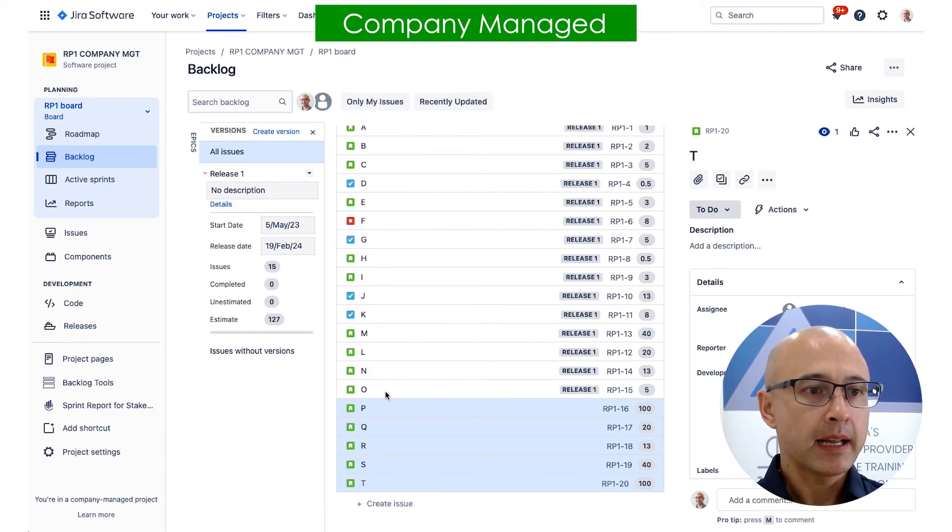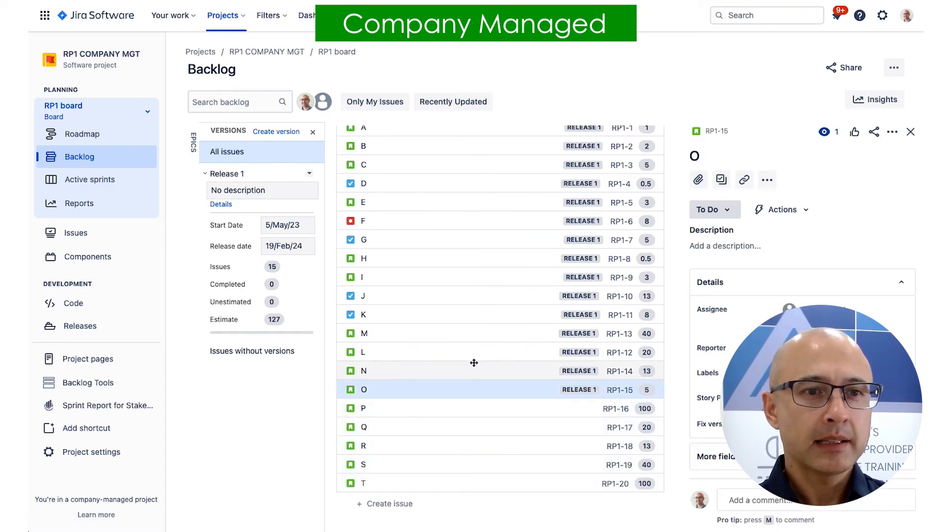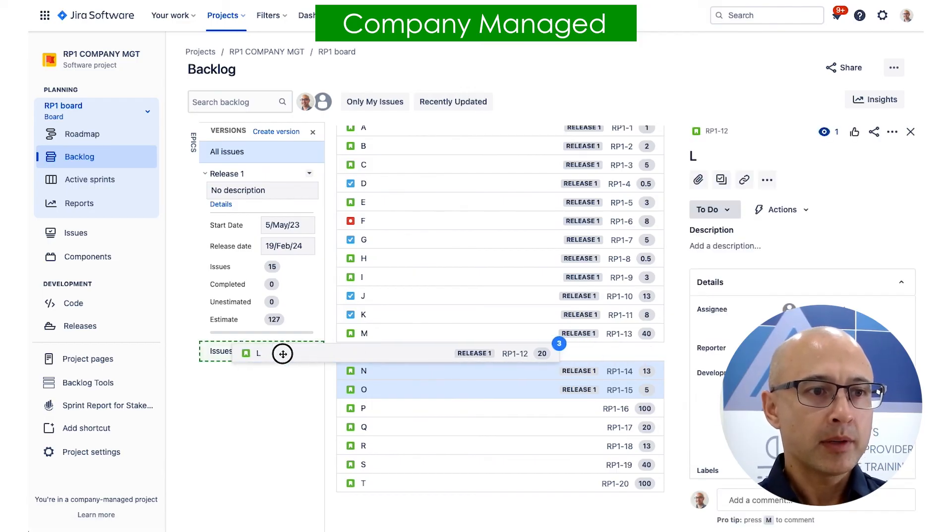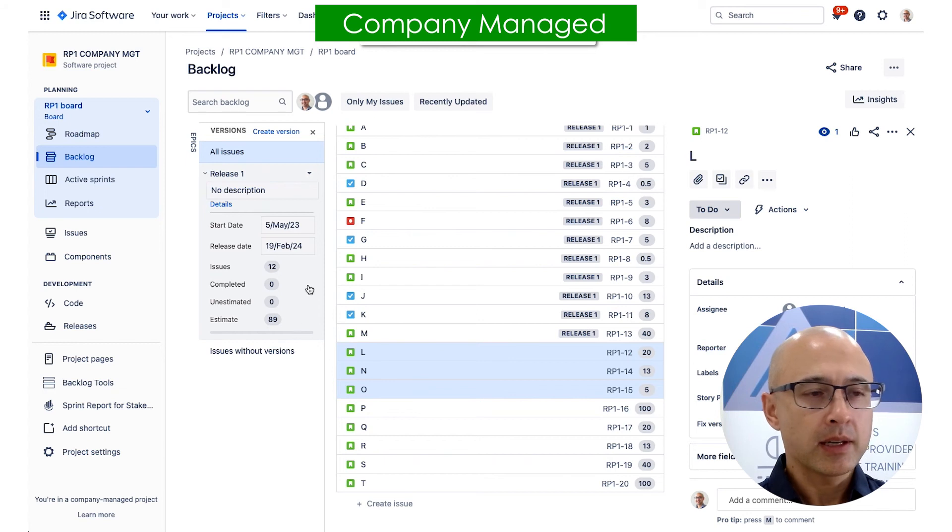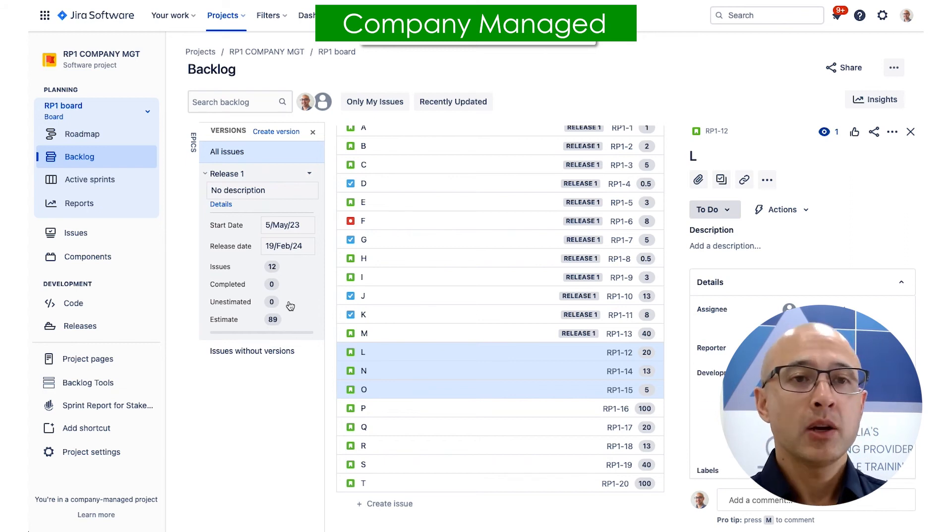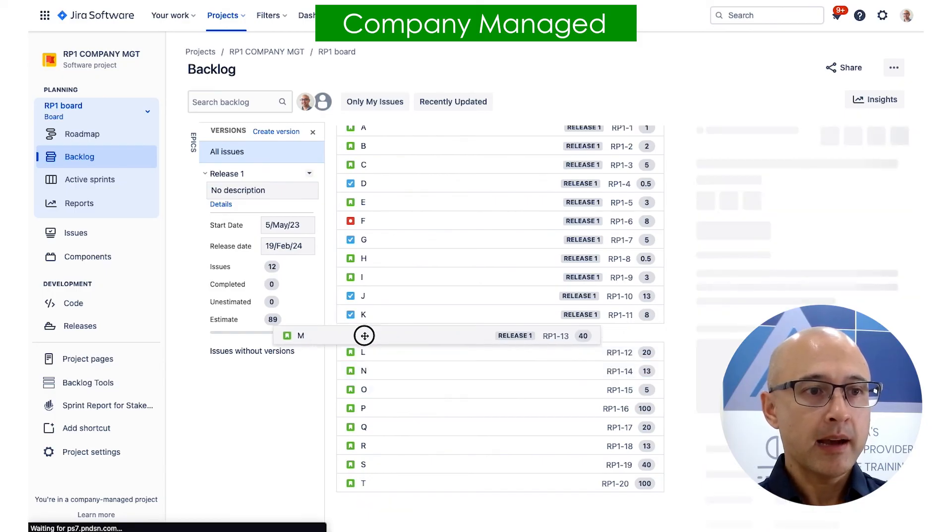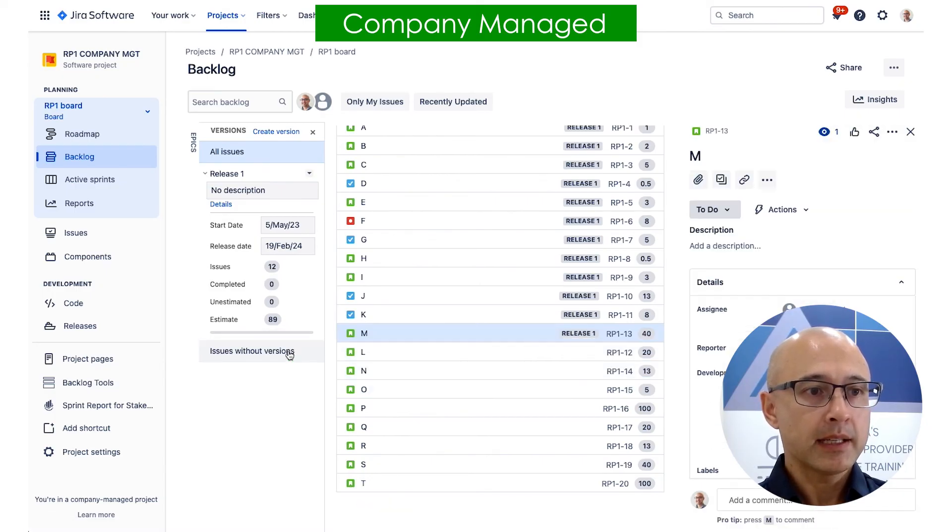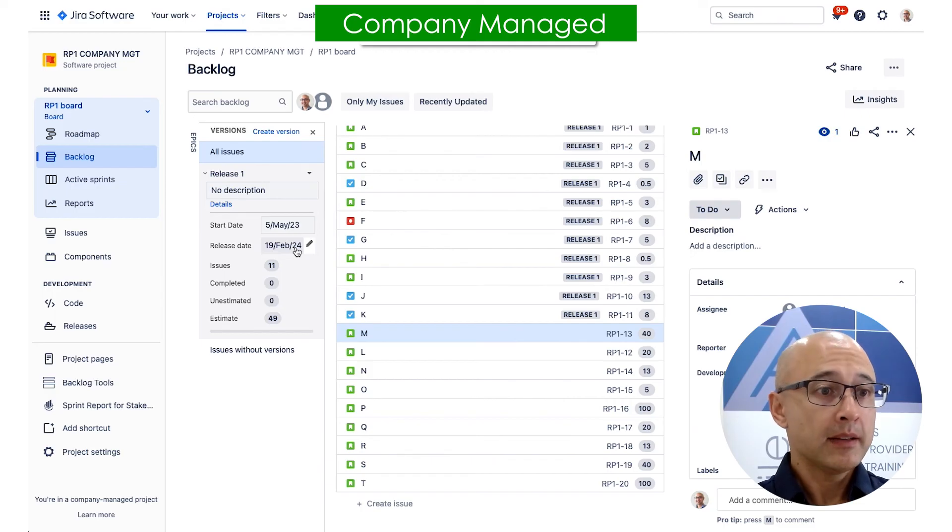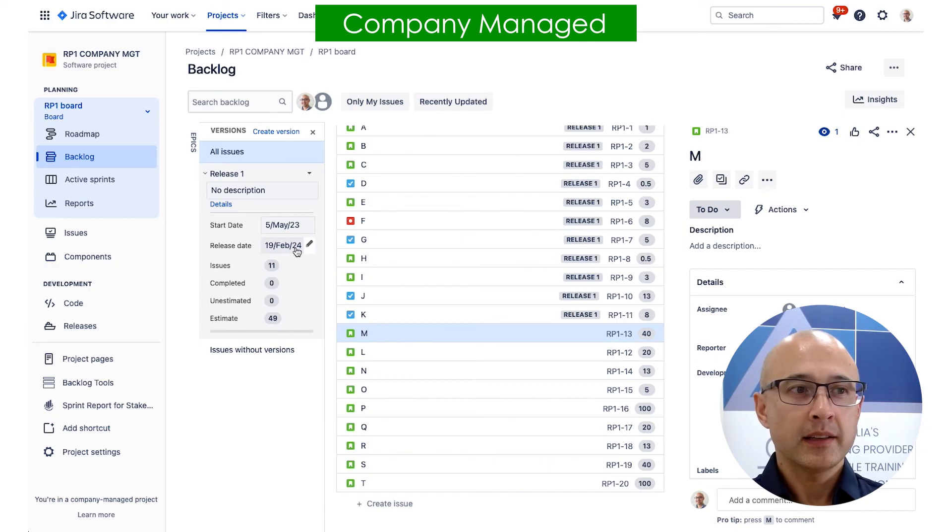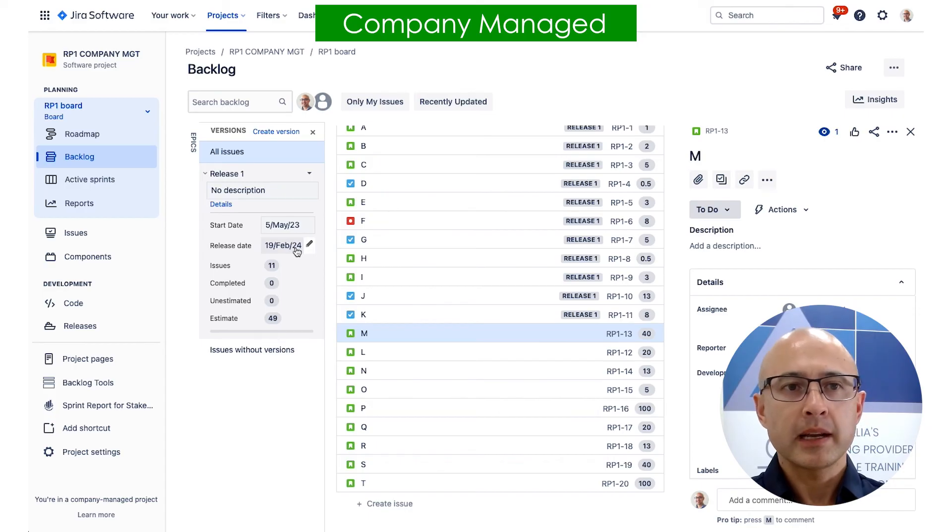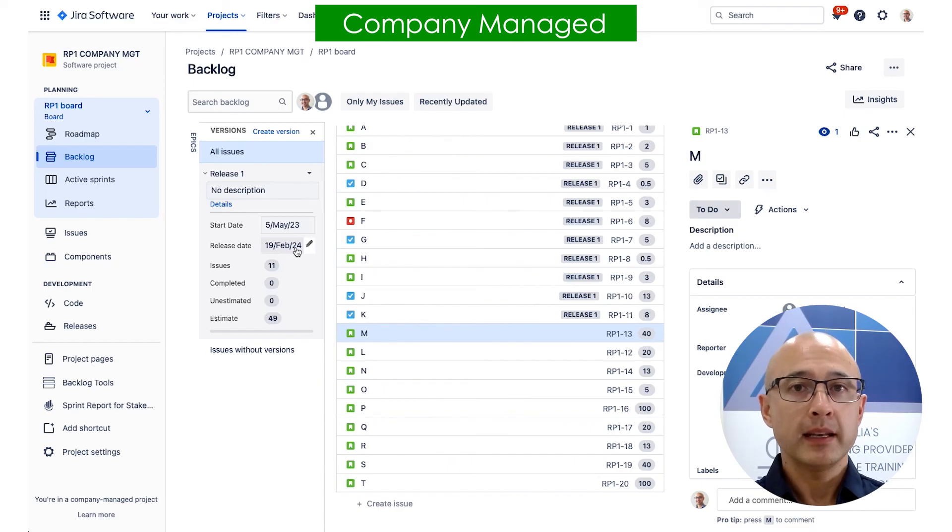So to do that, again, just like we did before, I'm going to start selecting items here. So let's say I take these three. I'm going to drop them onto issues without aversion. And you can see the numbers drop down to 89. So not quite enough. The next one here, 40 points, I'm going to take that one out of the release. And where are we at? We're at about 49 points here. So that can definitely get done within the release, our 78 points that we've got. And we can work with that. We can go talk to our stakeholder and say, okay, this is what's going to be potentially delivered within this next release.